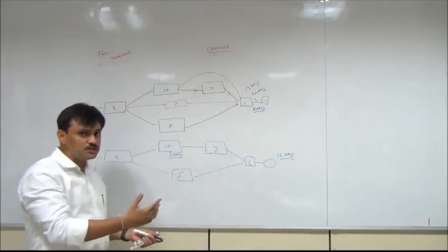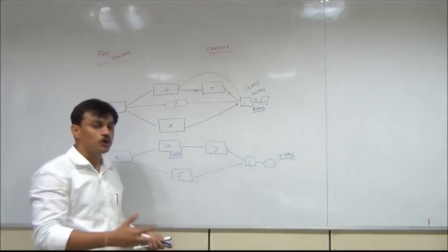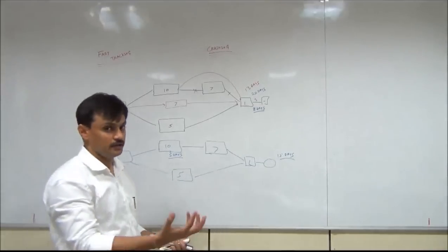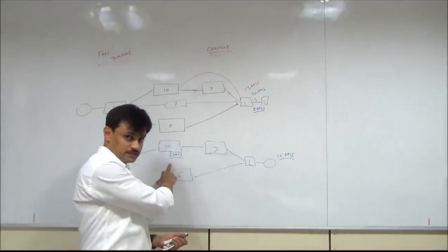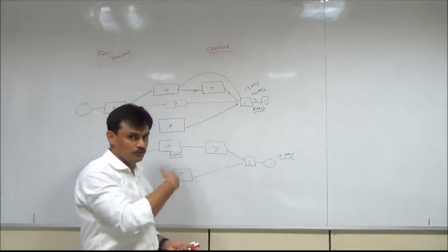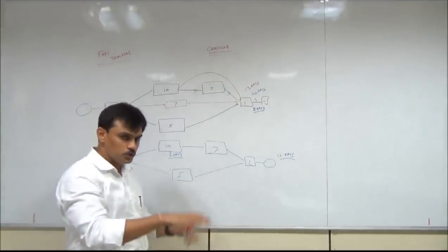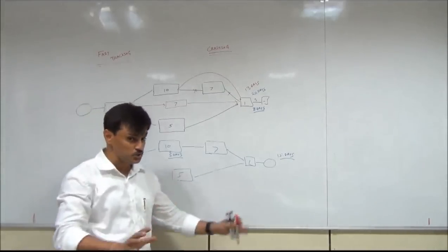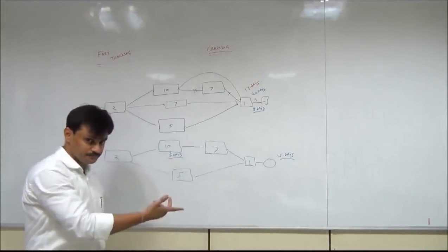Now when we are doing crashing, it is expensive because you are paying overtime or you are hiring more people for these particular activities. You should not assume that I have people who are sitting somewhere, so I just put them and it will not cost money. You assume that your project has been well resourced, so it will cost you more money.